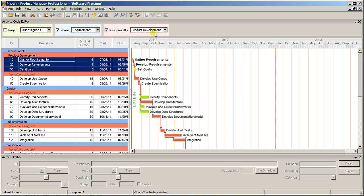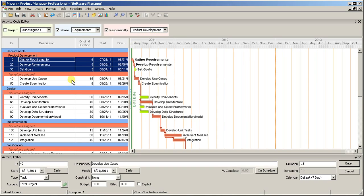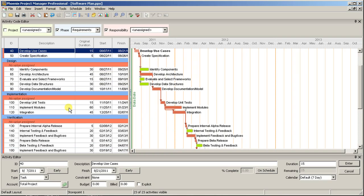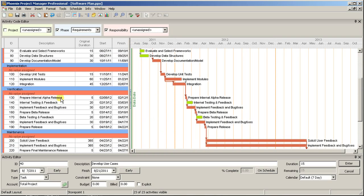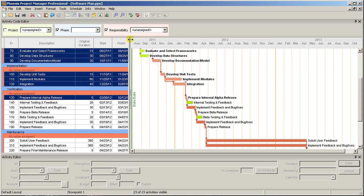You can then repeat this for the rest of the activities. If you have any activities that should not have any value for a particular code, you can either leave them unassigned, or select the special None value under that code.